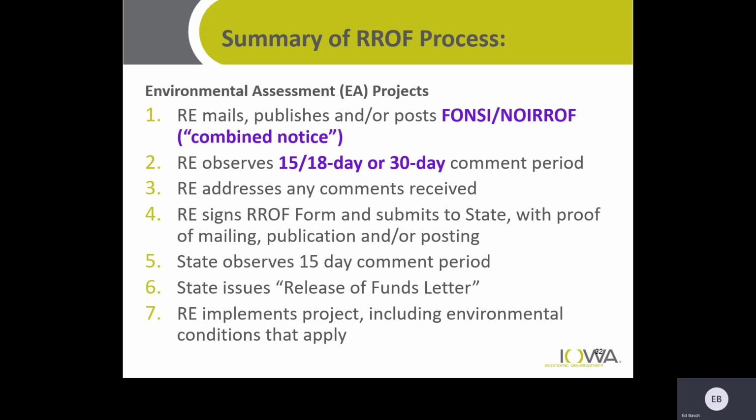The RE addresses any comments received during the comment period. Again, just like the previous slide, signs the form, submits to the state, proof of mailings, if there are any, publication and or posting. We then have our 15-day comment period. Again, we do our release of funds letter and you're good to go.